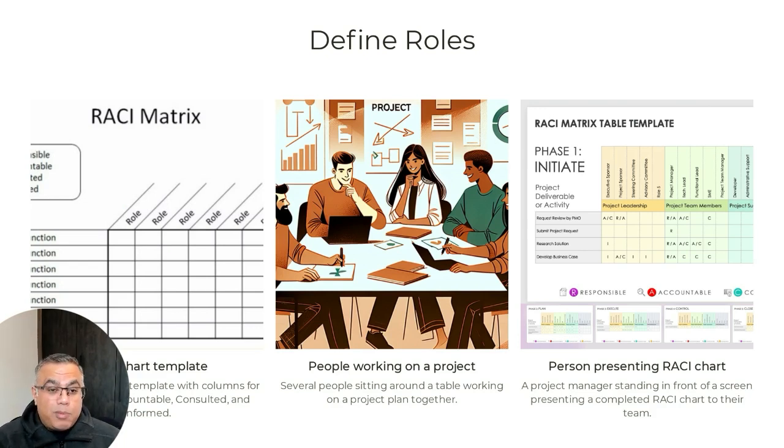And speak to your people, just communicate to them, talk to them, understand what's going on, is really key. And then I would review your RACI matrix on a regular basis too. If you're not familiar with RACI, RACI stands for Responsible, Accountable, Consultative, Informed. Four elements. You identify who's responsible, who's accountable, who you consult, and who you inform for each activity or responsibility within the project, depending on how you wish to use it. But defining the roles is really going to help you understand what part they play within your project.